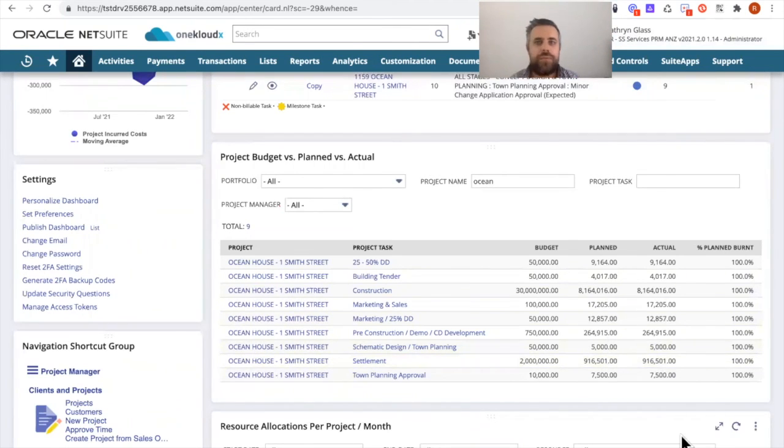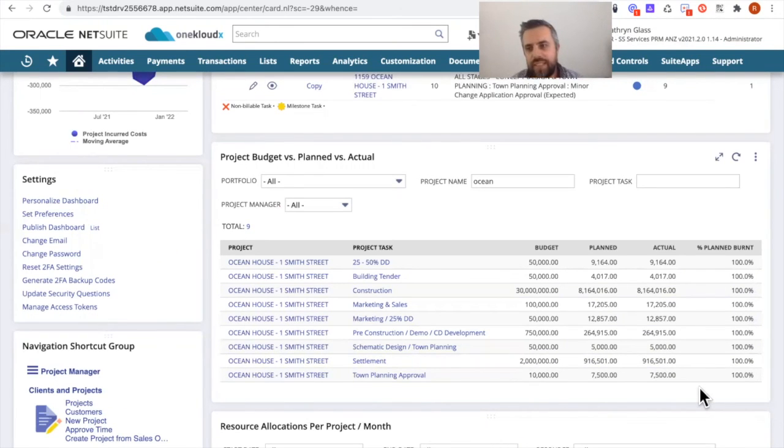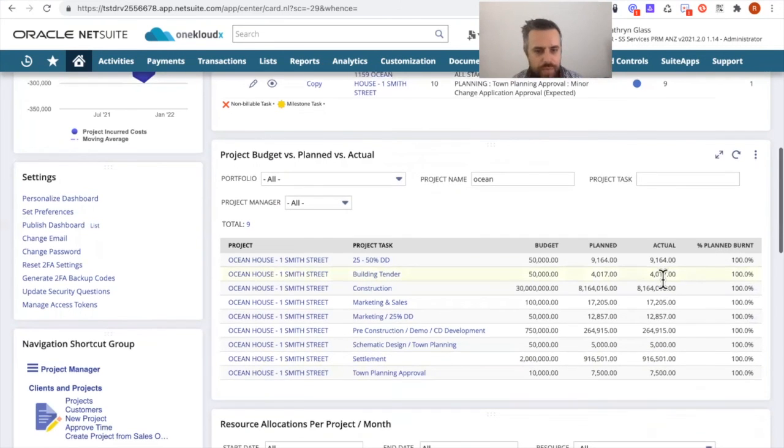And the actuals represent the actual bills, which is the actual supplier invoices. And therefore how much have you actually burnt against the planned budget versus actual.